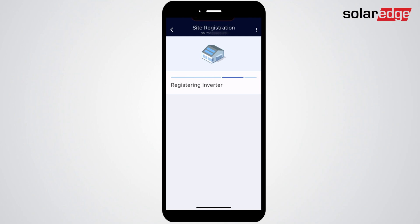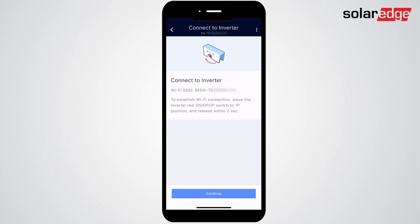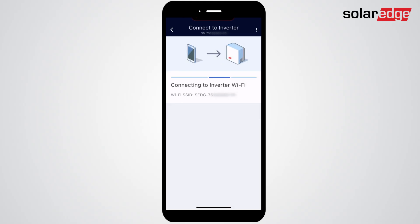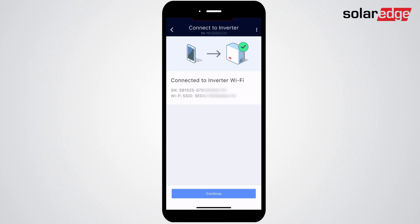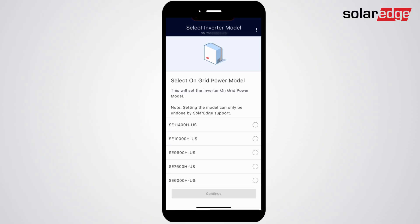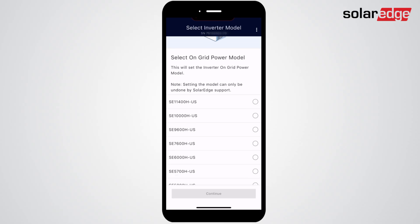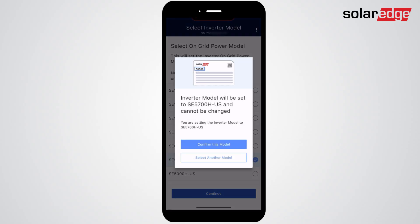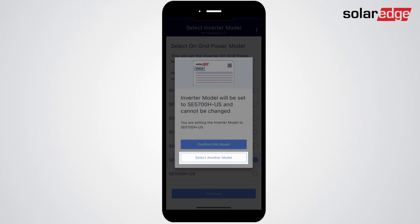Next, follow the instructions on the screen to connect to the inverter for commissioning. Select the power rating per your site plans and label applied. Note that once a power rating has been selected, it cannot be changed without contacting SolarEdge Support. If you didn't apply the correct label, you'll be prompted to do so on the confirmation screen.